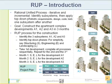Some of you might have guessed what happens with RAP. RAP is called the iterative and incremental model — baby steps, one at a time. RAP will first identify subsystems, take one subsystem, apply the processes, then move on to the second subsystem, apply the processes, then the third. The goal is the same: construct apartment complex developments A1, A2, and A3 in three months. The first question RAP asks is: how do I make the problem smaller? How do I logically break the goal into pieces? We need to build three things which are identical — and the key is identical.